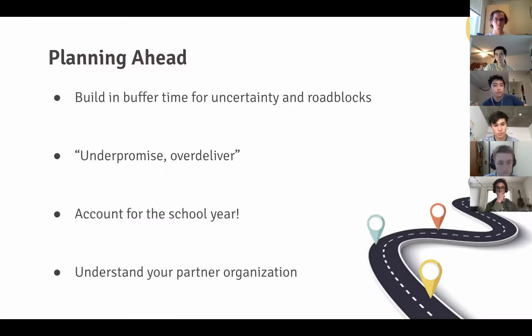Also, feature creep can occur, especially without a well-defined plan, right? Get your plan of what features to include down in writing before development starts, and make sure your partner organization agrees with it before development starts. This will reduce the probability of feature creep. Get it in writing, such as in a PRD document.